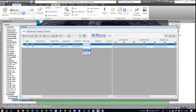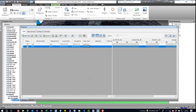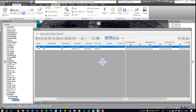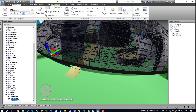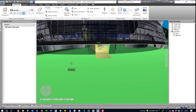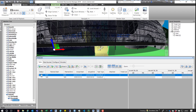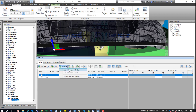Both of these tasks are being constructed, so we'll set them to Construct. If these don't give you all the options you want, you can add other task types to simulate, but in this example we'll set it to Construct. Now we'll attach the elements. I'll drag this window away, grab one of these panels, click Escape, then bring the window back in. With the first task selected, I'll come over to the Attach button, click on it, and say Attach Current Selection. We'll attach it and verify it's been attached to this task.